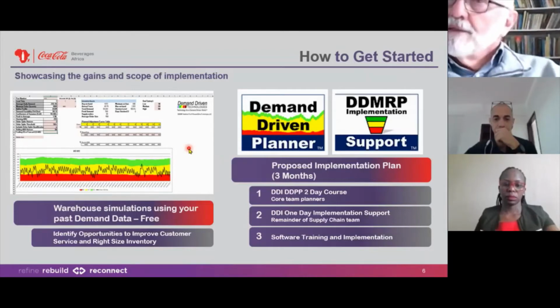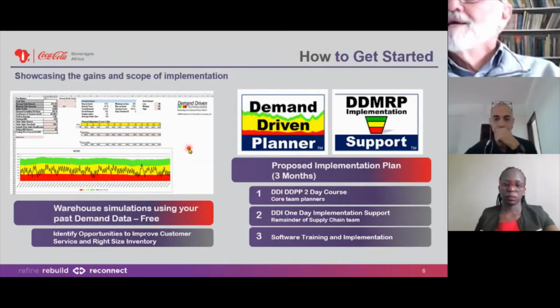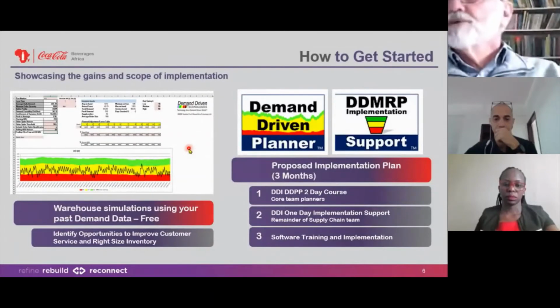And in all, that took about a month. And in all, we were doing about 1 country a month. So once we finished Namibia, we moved into Uganda, and we did Uganda, and then we did Mozambique. By the time we'd finished the 3 countries, the internal implementation team had sufficient knowledge and understanding of how to go and do this on their own. And we didn't really get too involved at the end of the day. So they went off and implemented in the other 6 countries.